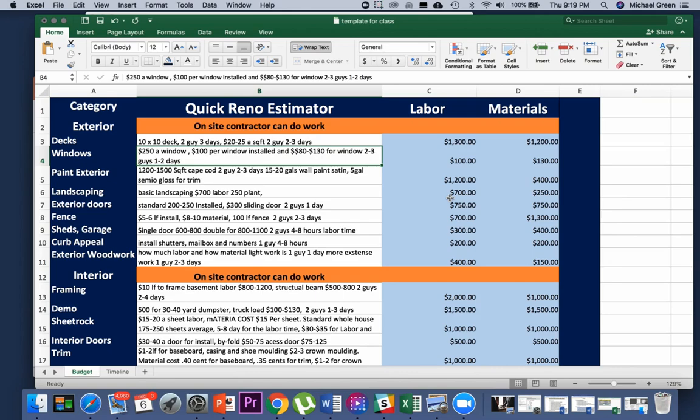So I usually just, if you see the house needs some basic landscaping, then $1,000 is fine. If it needs a little heavier end, like let's say a little more work, you go $2,000. And now when you see it needs like crazy landscaping, like it's a complete jungle and there's trees falling over, something like that might be like $3,000 to $4,000.